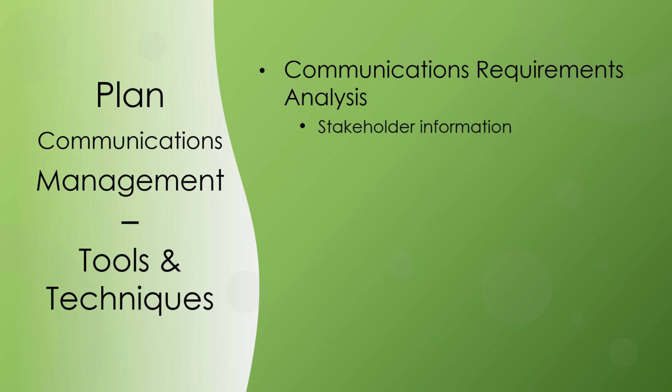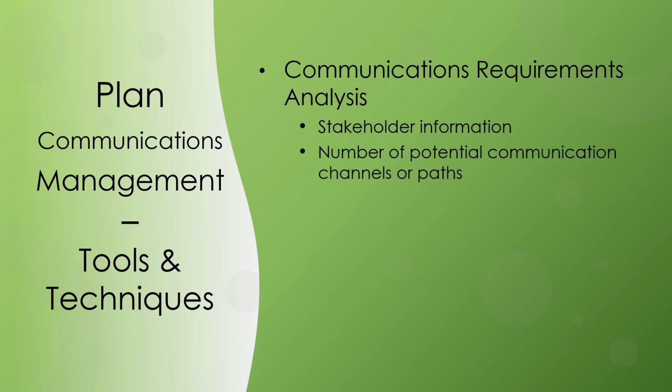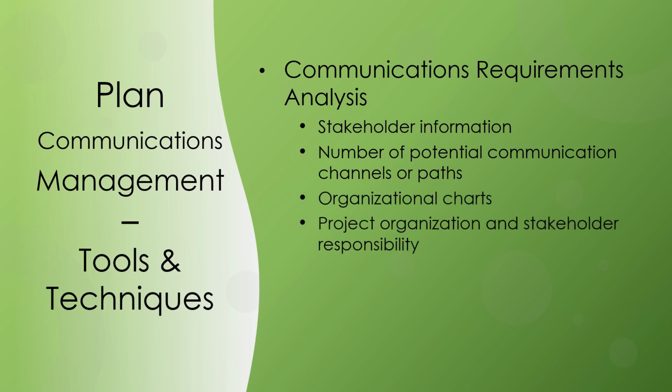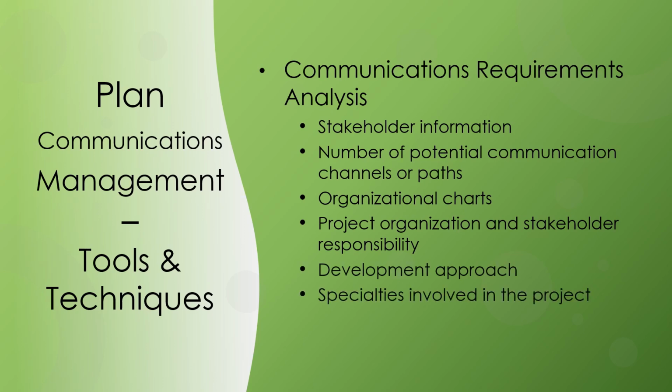from within the stakeholder register and stakeholder engagement plan, number of potential communication channels or paths, including one-to-one, one-to-many, and many-to-many communications, organizational charts, project organization and stakeholder responsibility, relationships and interdependencies, development approach, disciplines, departments, and specialties involved in the project, logistics of how many persons will be involved with the project and at which locations.